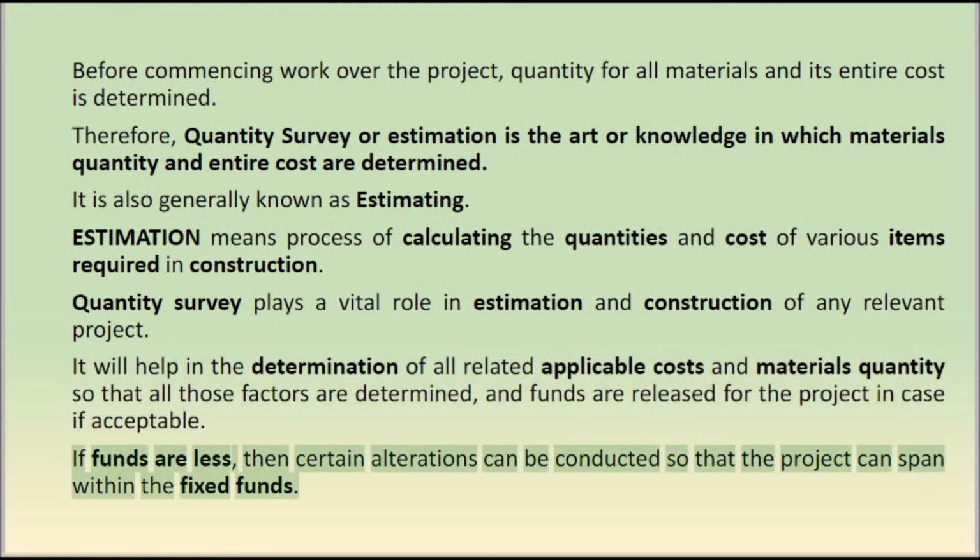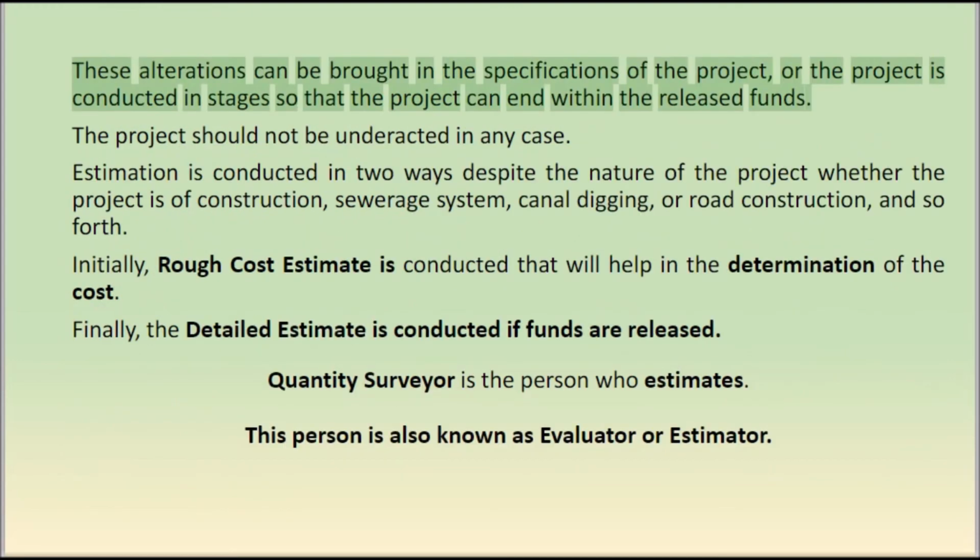If funds are less, then certain alterations can be conducted so that the project can span within the fixed funds. These alterations can be brought in the specifications of the project, or the project is conducted in stages so that the project can end within the released funds. The project should not be left incomplete in any case.